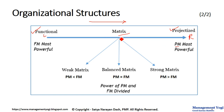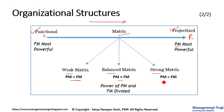In between, we have matrix organization, which has three types: weak matrix, balanced matrix, and strong matrix. In a weak matrix, the project manager's power and authority is less than the functional manager. In a balanced matrix, the project manager's power and authority is equalized with the functional manager. And in a strong matrix, the project manager has more power than the functional manager.